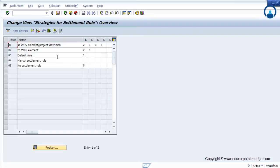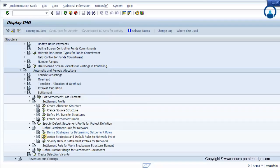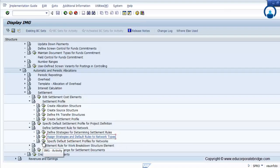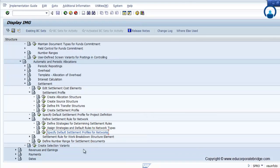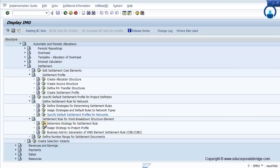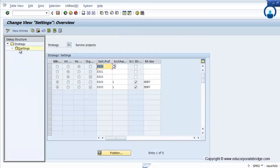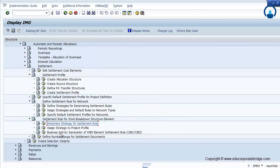Same way, you can define the settlement profile and settlement rule for a network also. Define the strategy for settlement — whether it is the strategy for that particular WBS or a settlement rule — and later assign the strategy to the network type. Assign the settlement profile to the network. Then settlement rule for WBS: determine strategy for settlement rule, and same way the network strategy. We also have to assign the WBS strategy, considering billing or account assignment, what the settlement profile is, and what account assignment to maintain. These settings are done by the FICO consultant.